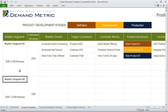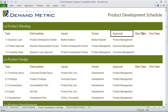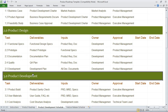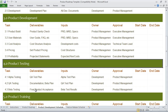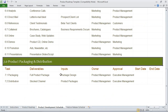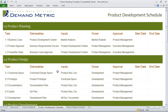Once you've identified all of the information in the product roadmap tab, in the product development schedule, this is where you actually have different tasks, deliverables, inputs, owner approval, and you outline a start date and end date for each of the different tasks. So we've got product planning, product design, product development, product testing, training, promotion, and packaging and distribution. You can obviously add things if required, but this is a really good starting point for managing the development schedule.